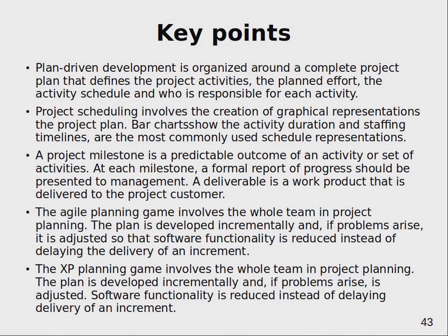And remember that you may put your milestones when you think it is a good time to put milestones, but you always need to check what kind of milestones you should put according to requirements from the external world. Because if you have some dependencies, you need to synchronize some actions, then you may need to do some checks before some kind of deliveries and other things.